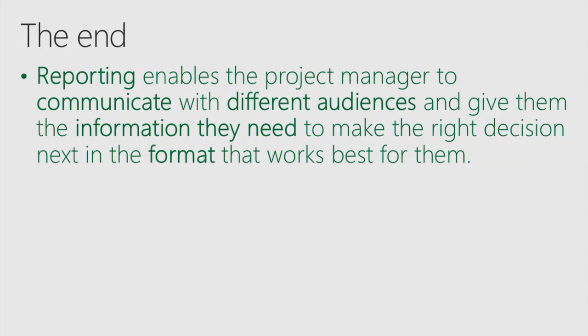I've got one last thing to add. One thing that you can do with this, and I've got a customer that does this, is this. We've just shown this in a single project. Okay, this will work in a master project environment. So if you've got a master project and you've inserted multiple projects as part of that program, then this reporting will work over that process as well. So if you need to do a program report across multiple projects, then again, you can open up that master project, insert those individual projects, and run your reports. The investment, of course, is up the front, but you get that back time and time again.